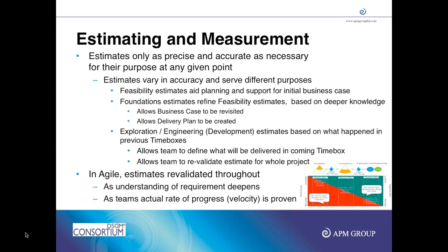Just like that, we take each story and we size it. Is it small, medium, or large? Some companies, some people prefer to give small, medium, or large. Some people give some other rating like complexity: simple, medium complex, and very complex. And few people give numbers like 1, 3, 5, 7, 9, or 1, 3, 5, then 8, then 13. So you can have either numbers or complexity ratings. Velocity means within a given time box how many story points are being completed.